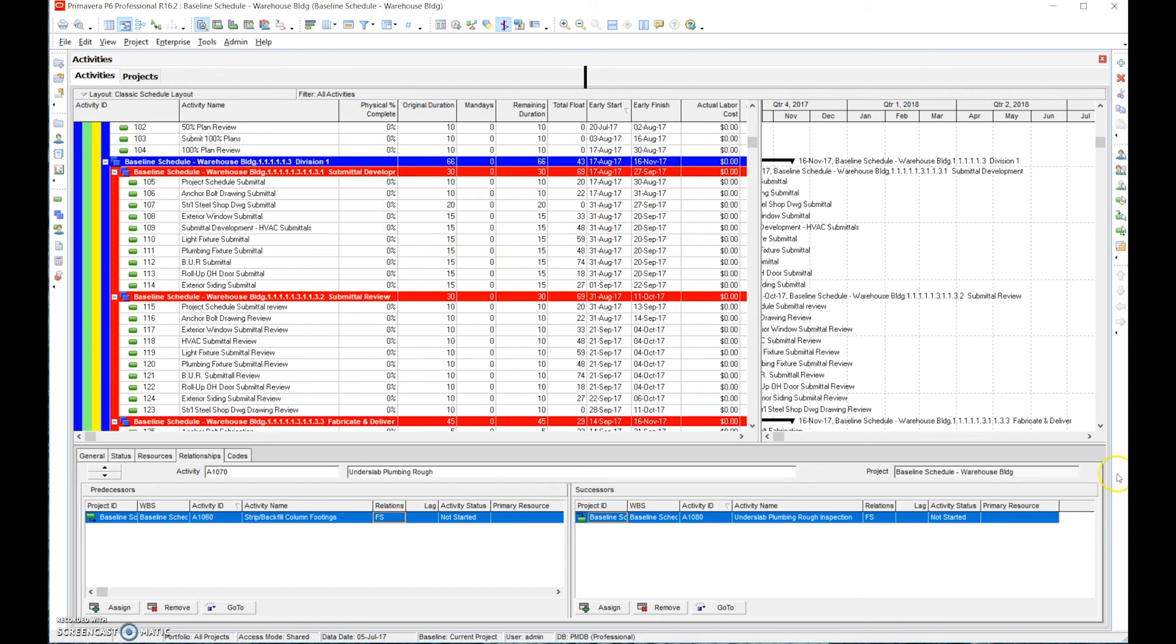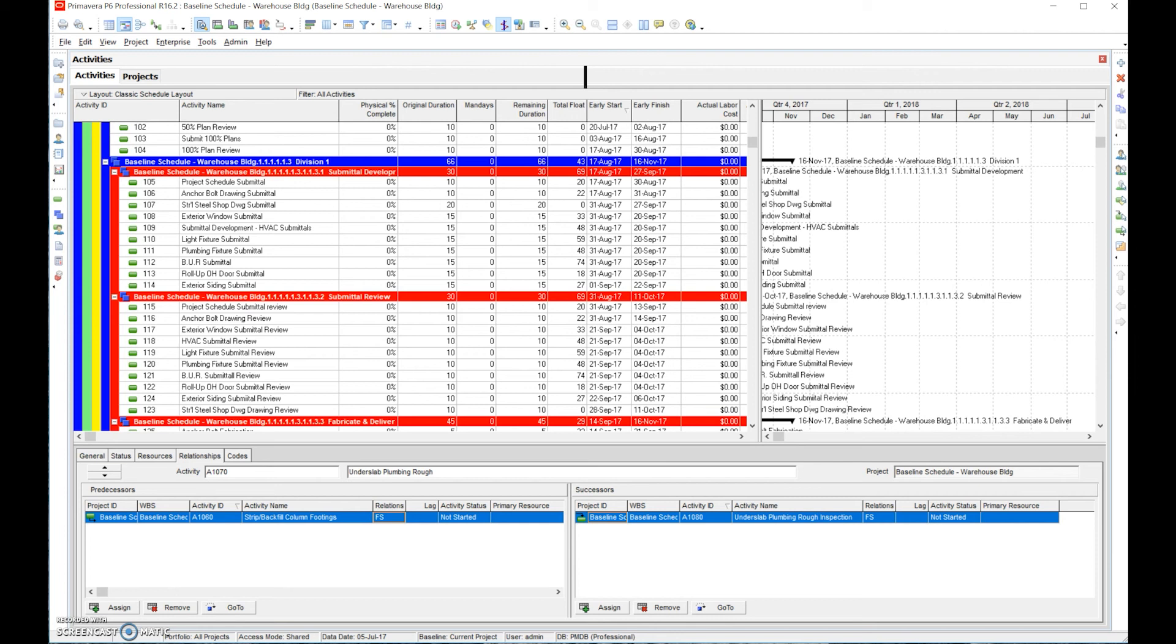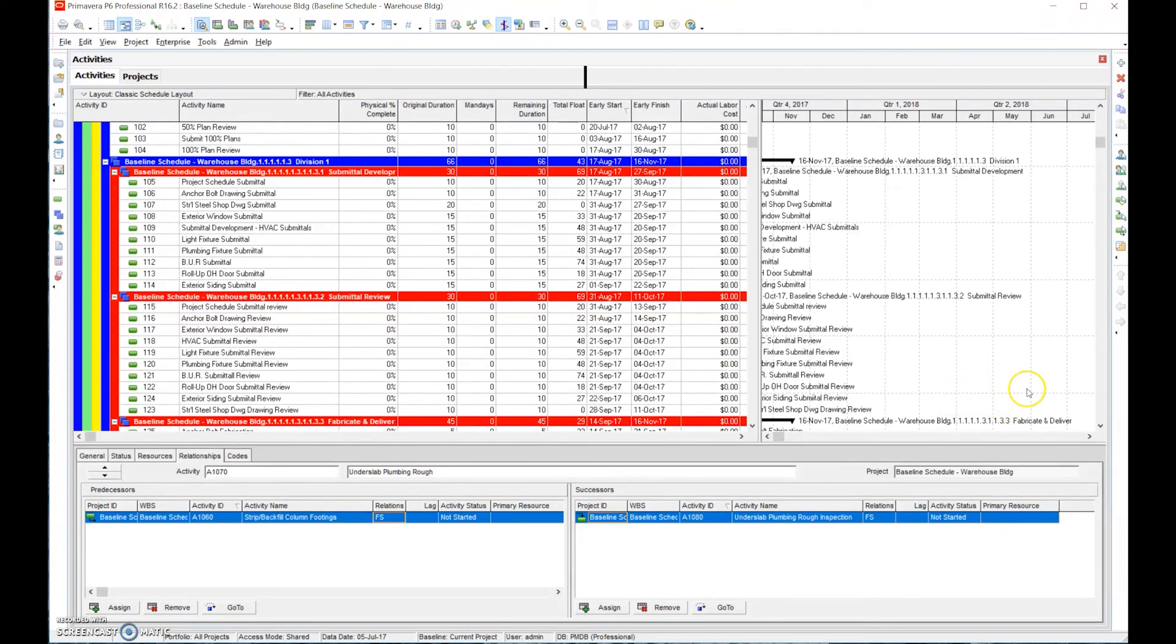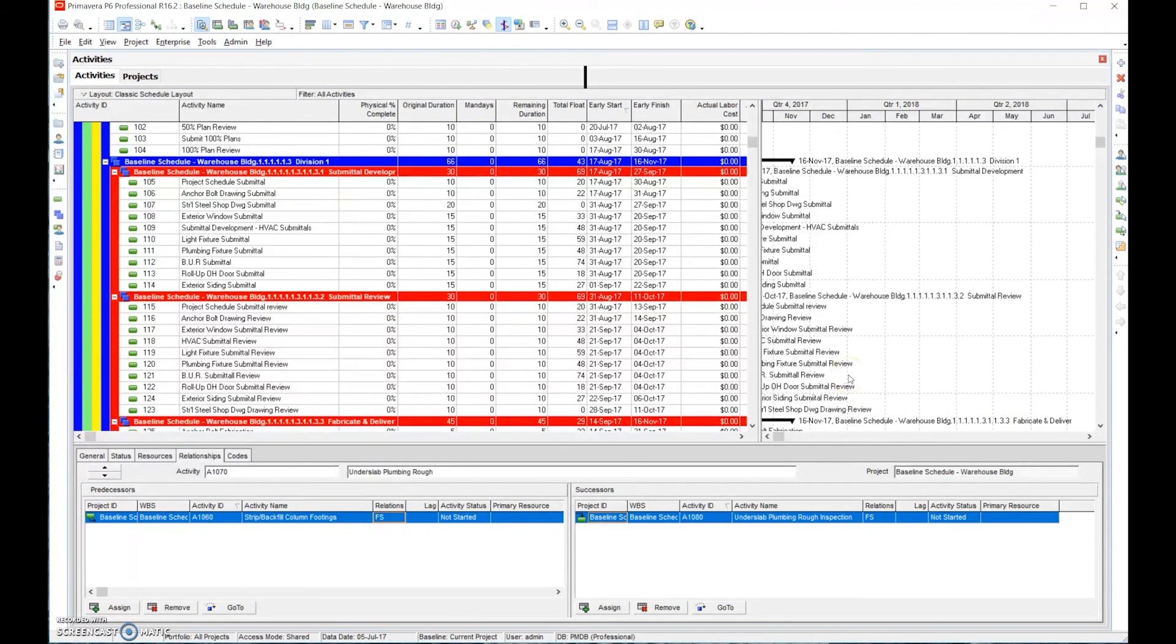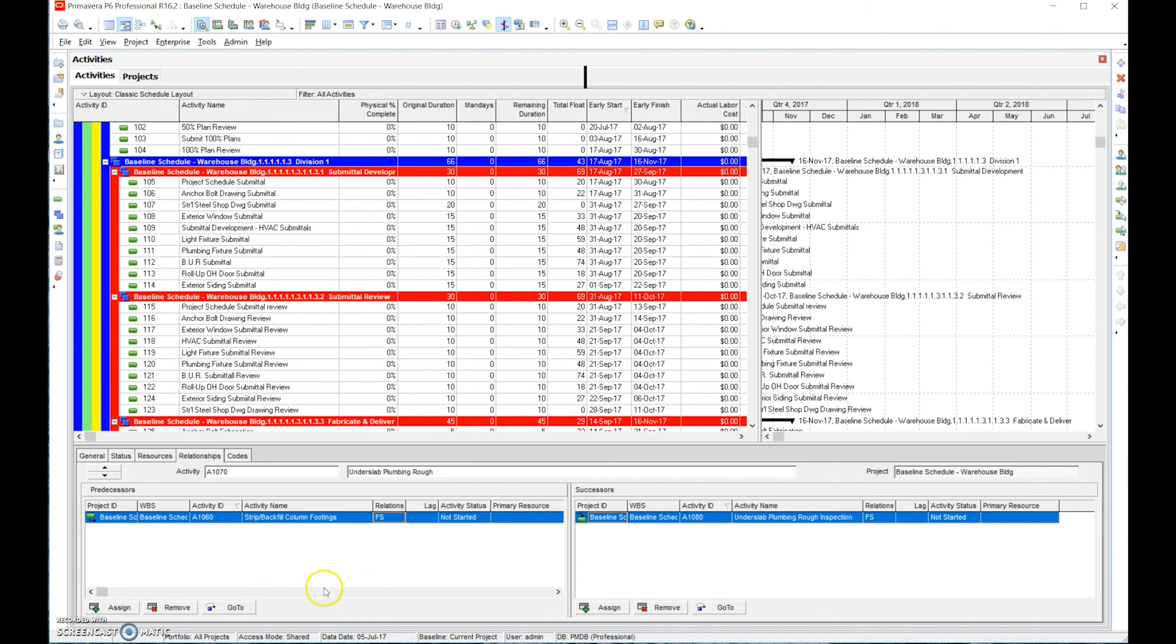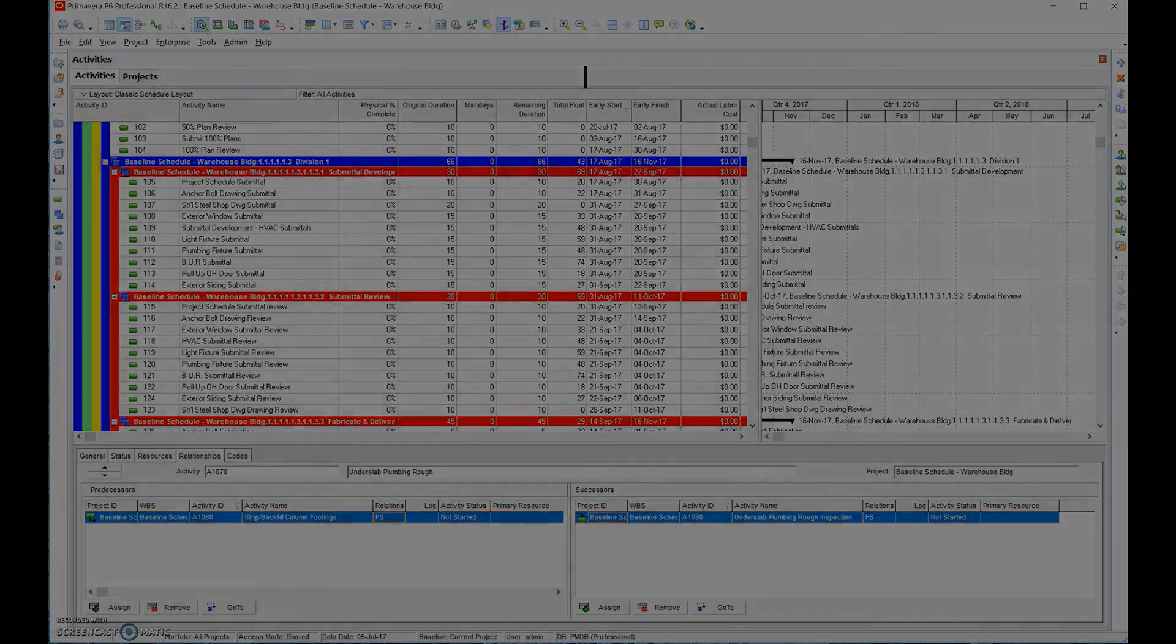So at the end of this step, every activity should have a successor that allows us to have float numbers that actually have meaning. And that pretty much covers successors. We've gone over that a successor one is a predecessor of another. We've talked about having a closed network. We talked about being methodical and putting in all the predecessors and then putting in all the successors. We talked about the float not having meaning unless it has a closed network. We want to make sure the last activity has a date constraint to it. We want to make sure there is no negative float when we put a baseline schedule together. And we want to make sure we understand that total float is simply the available slack in the schedule. So that covers step number eight, successors.